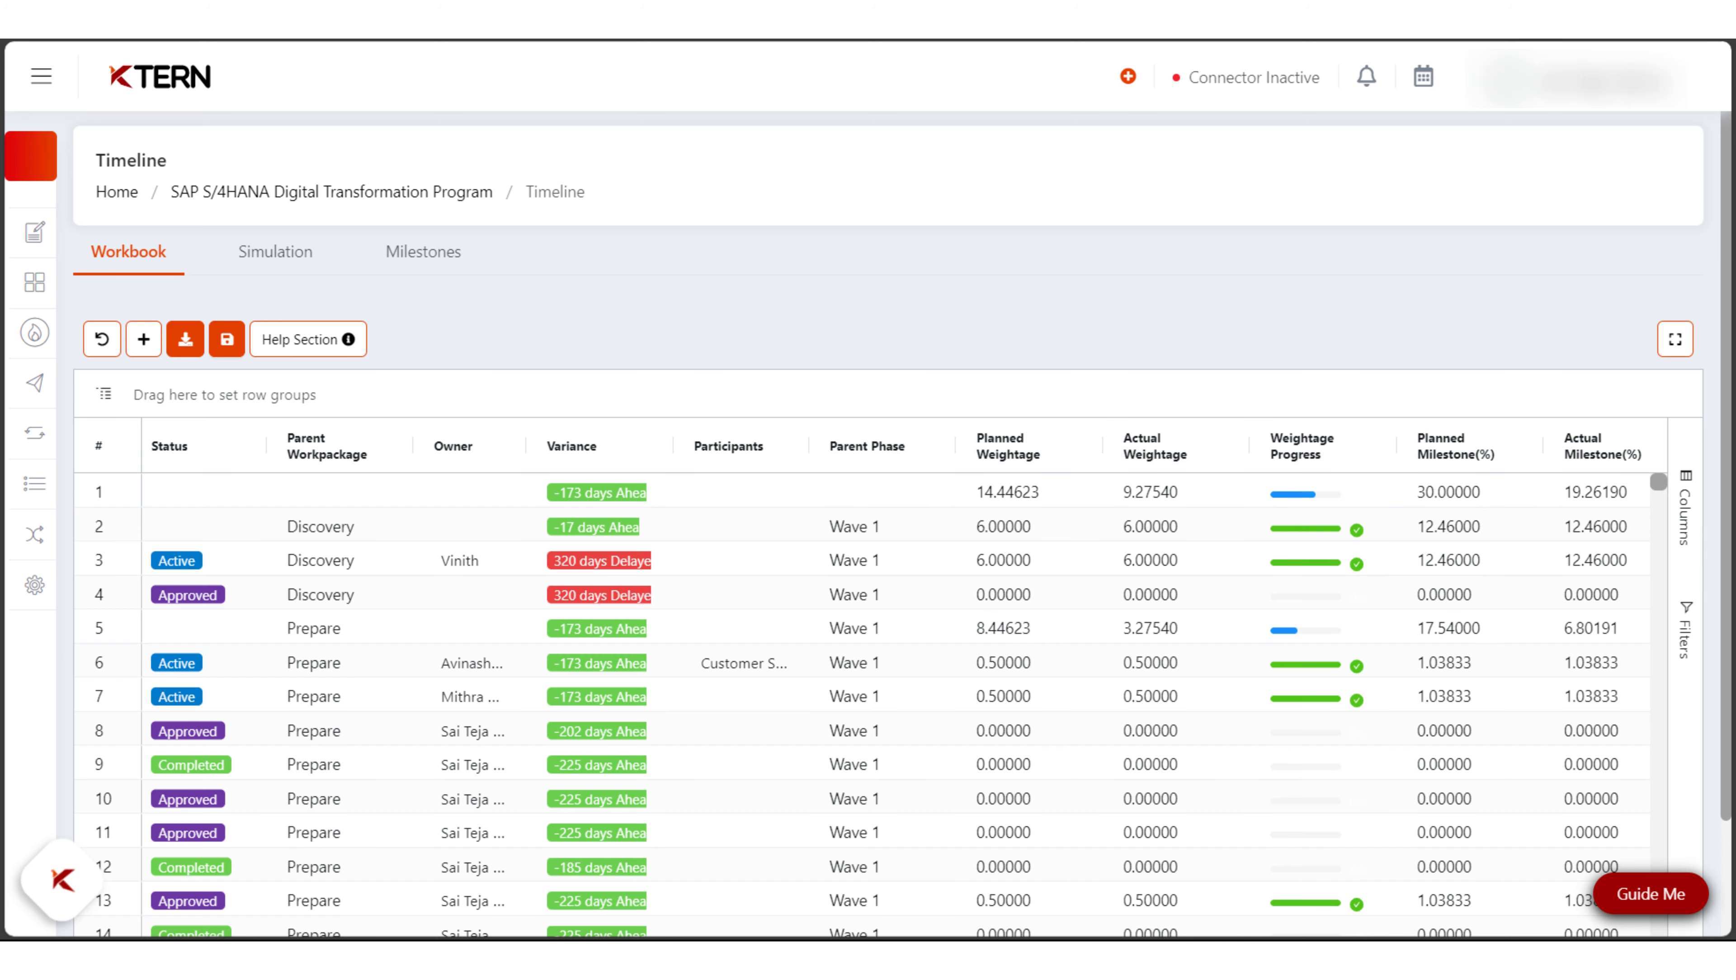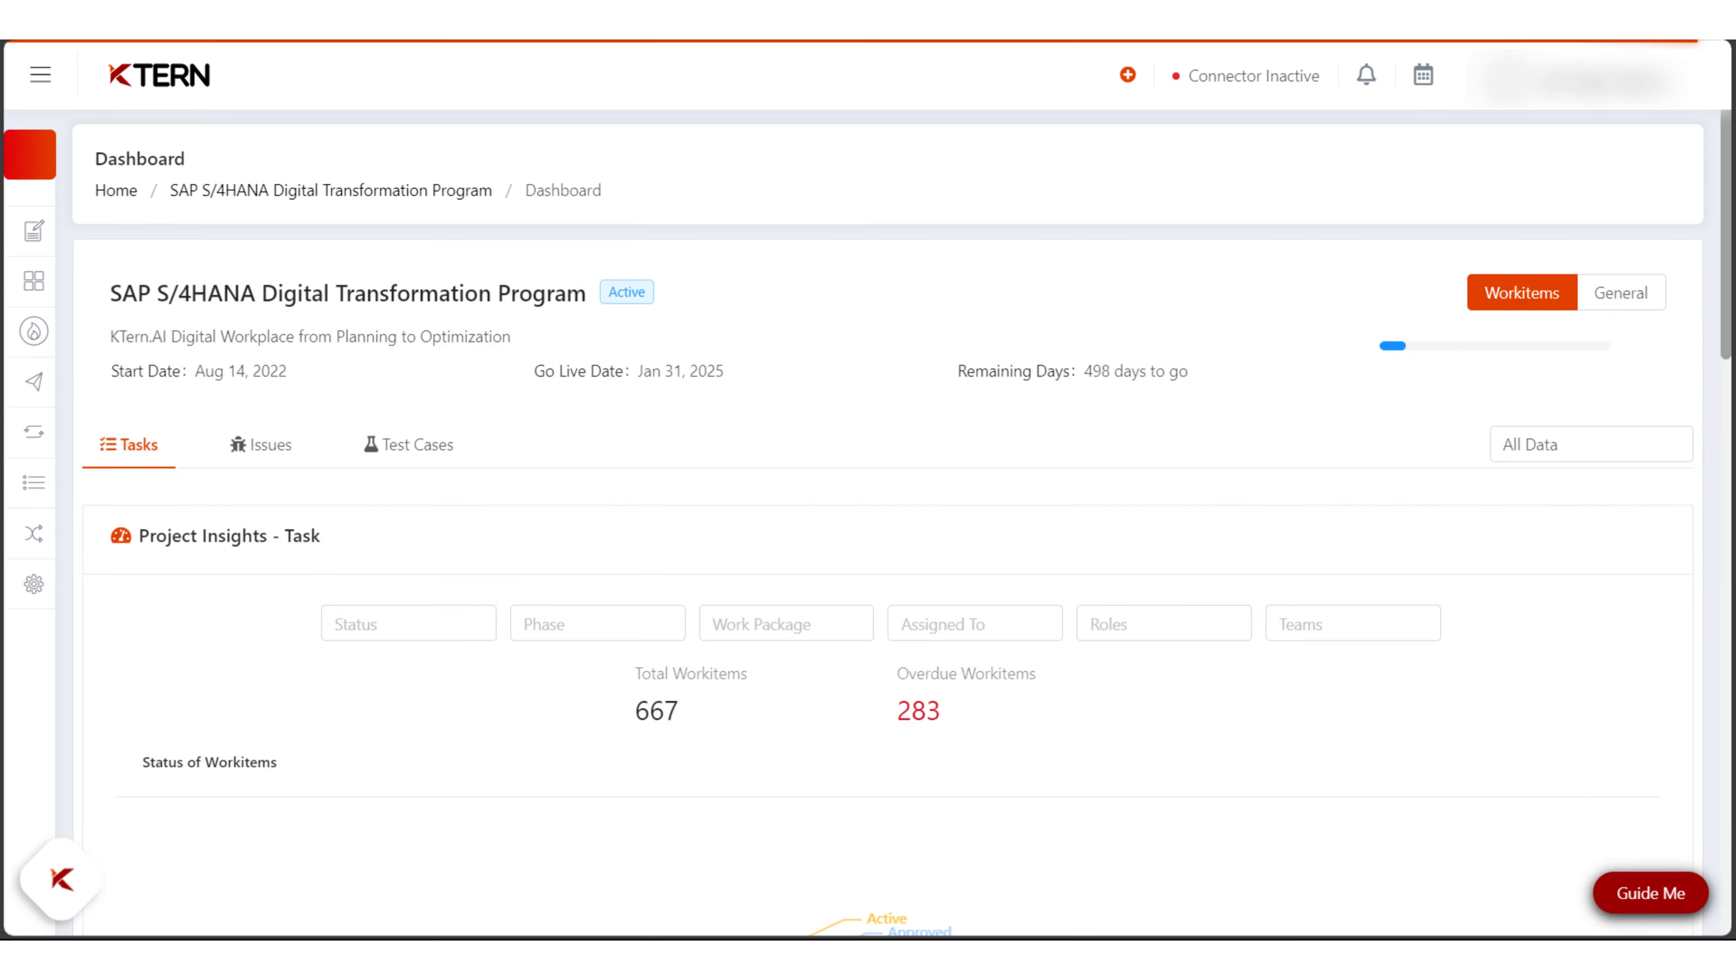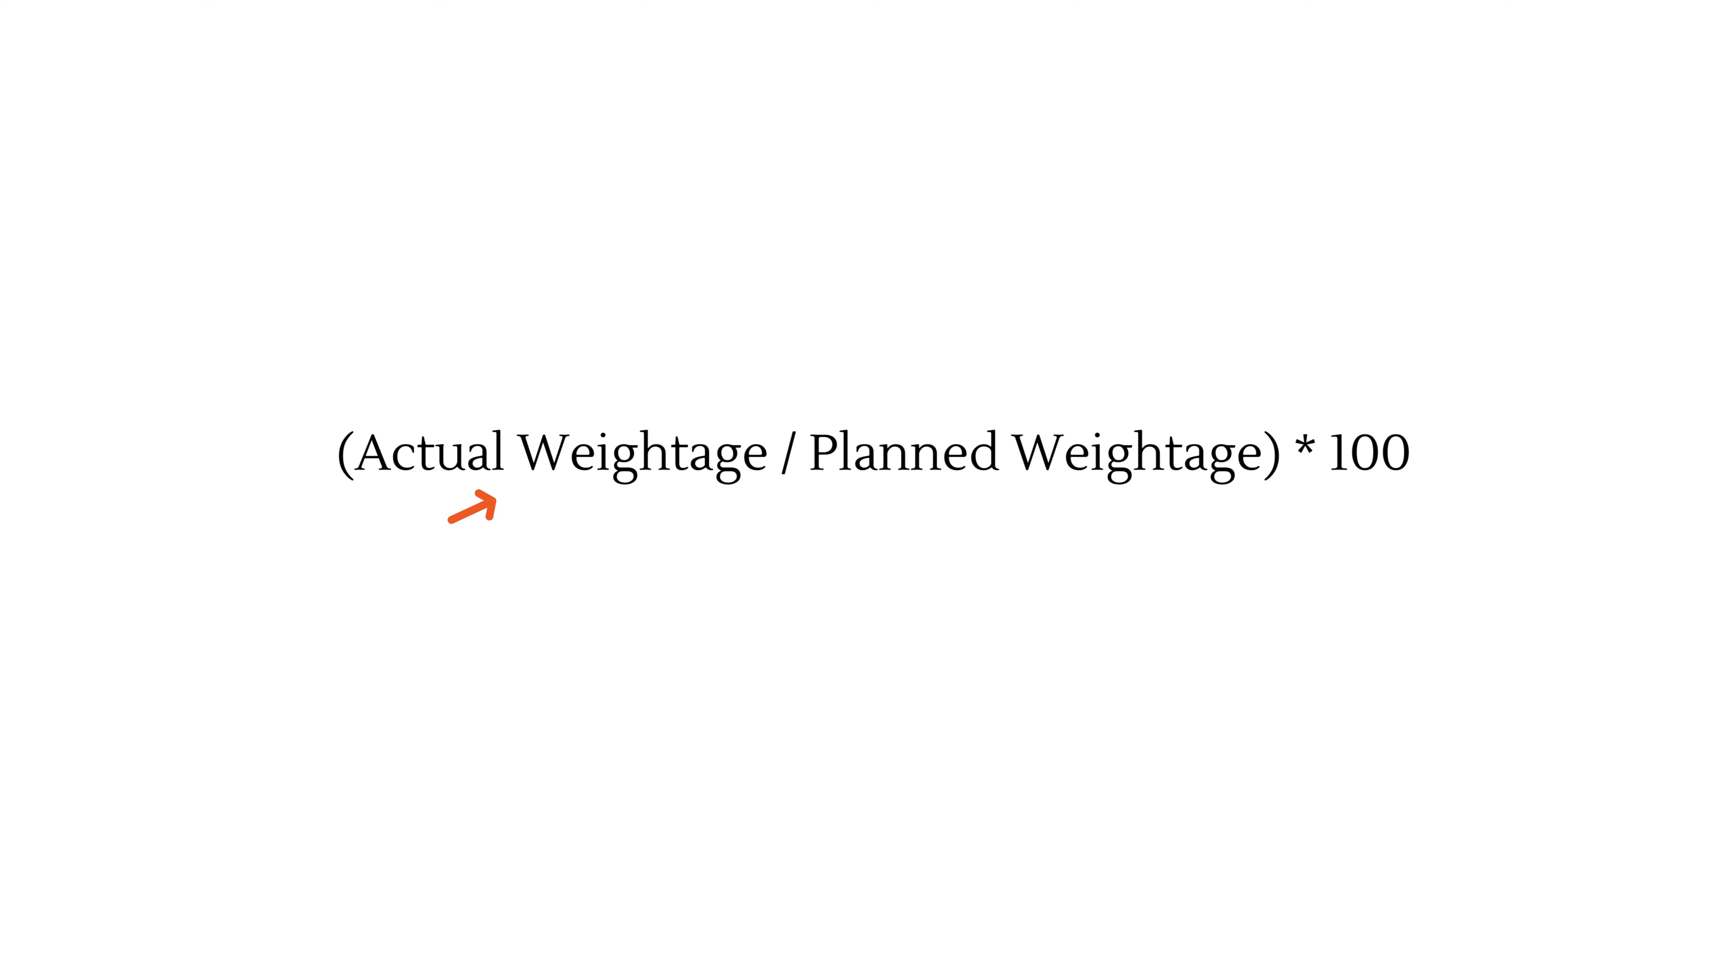Task weightage: in your project plan workbook, you can assign plan weightages to each task. During the project, kturn calculates the actual weightage based on task completion. In the dashboard, for all tasks, it's actual weightage divided by planned weightage multiplied by 100, providing a precise project progress measurement.